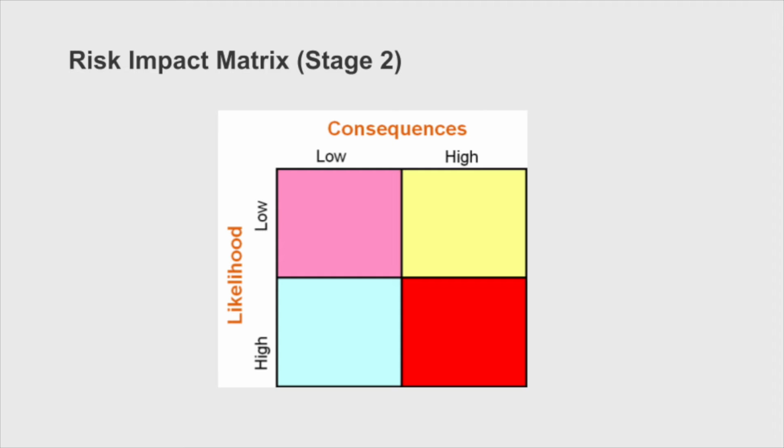A ladder falling down or a ladder breaking could have consequences if it fell on someone, but in terms of the overall success of the project, probably very low. So once we evaluate what is the likelihood and what is the consequence, then we can put them on this kind of what we call a matrix here. And what we're looking for to spend our time on is high consequence, high likelihood issues, the light blue box.